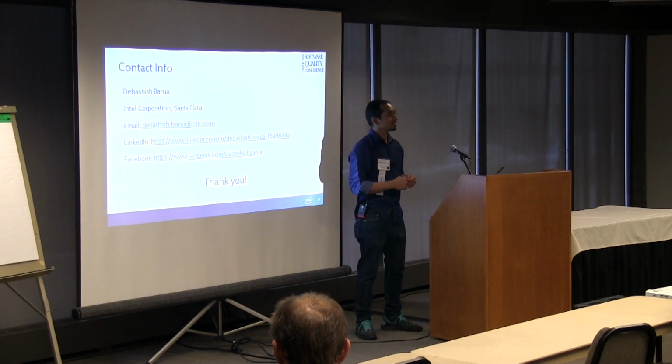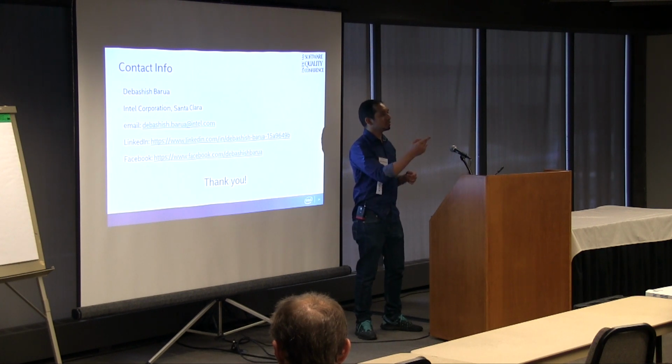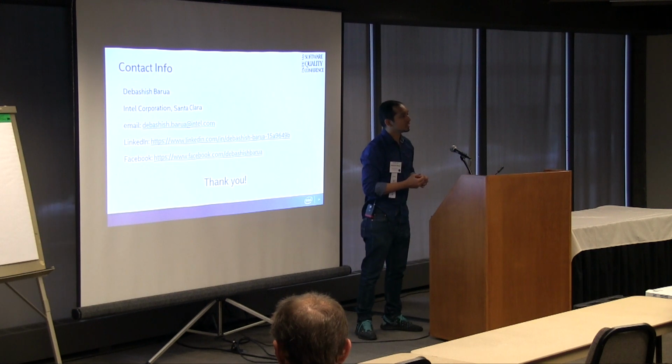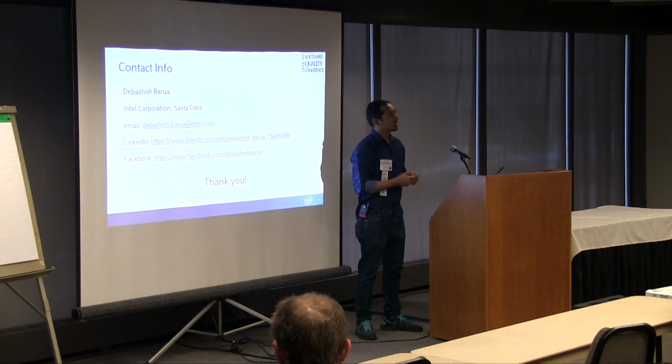One of the traditional ways to do this analysis is with the defect find rate rather than the cumulative defects. Did you try that, and what did you find? What do you mean by defect find rate? You map the defect find rate over time, and you see a curve that's going the opposite of your curve, and it has a more visible inflection point.